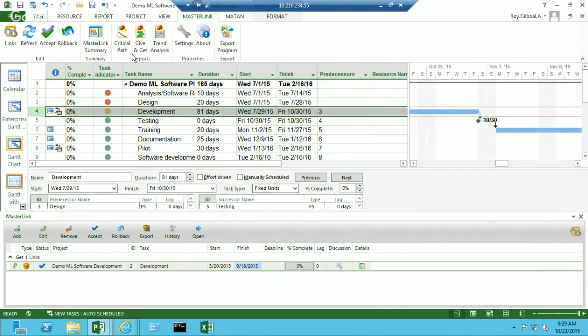And we also have a website, which is the reports. In order to use the reports, you do not have to use Project Professional. You can see them through the PWA, Project Web Access. You could assimilate them into the project site, or whatever SharePoint structure you are using. We have 3 basic reports. We have the critical path, which will allow you to see the critical path not only in the project but in the program view, which in the out-of-the-box tool you can only use if you are using a master project, which is sometimes too big to see the whole picture.